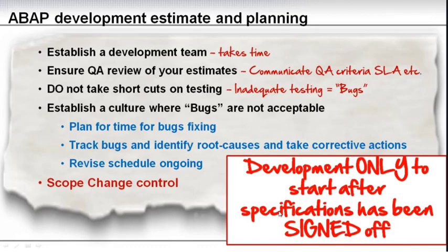I've seen this on many occasions, that you persuade the development team to start without the proper signed off specification. It will change, and even though you have scope change control, you're now in a situation where you have no choice other than to accept the change, and it might in many cases require rework and delays. So with that good advice, let's look at the controlling part.